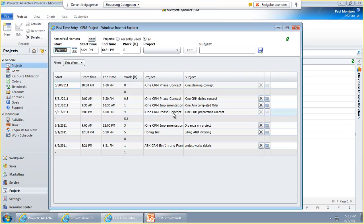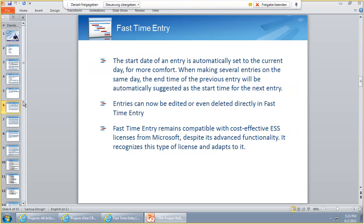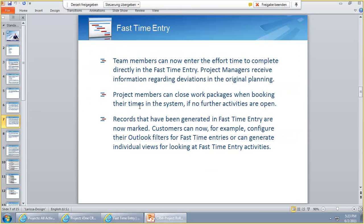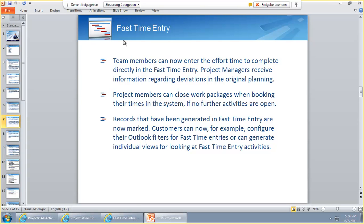Additionally, we have this functionality here. We have now Effort to Complete. It's not only in the Fast Time Entry. Effort to Complete is a big thing that has been requested by a lot of customers. Now we have released the Effort to Complete functionality throughout all the activities that can be used for time entry. This is a new feature that is given to all customers with Rollup 7.